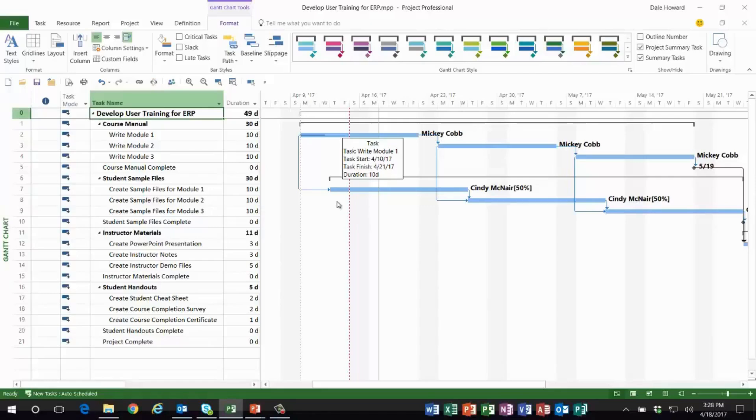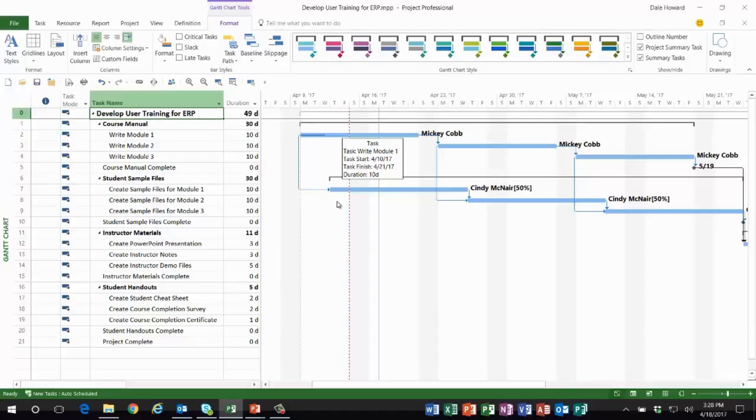have worked on that task, but she didn't even get started because Mickey was so far behind schedule. We cannot allow uncompleted work to remain in the past because that means our schedule is wrong and our resource availability information